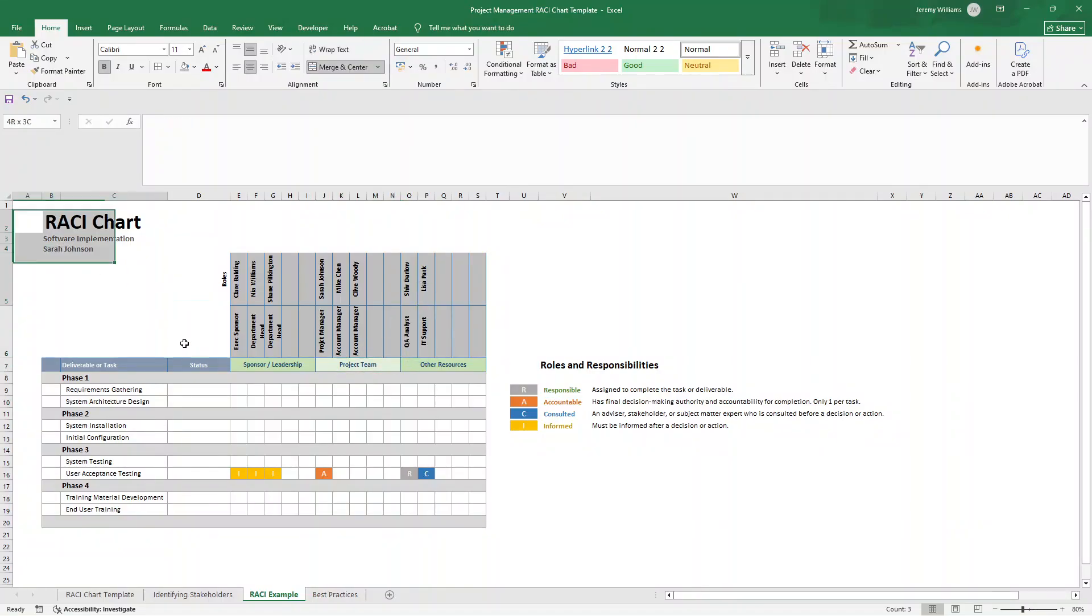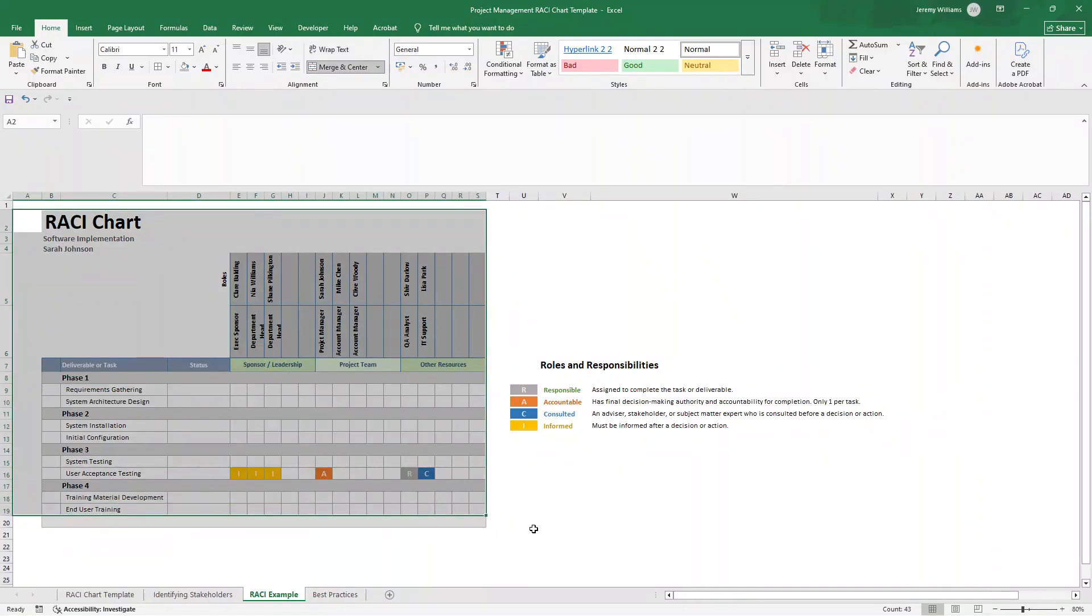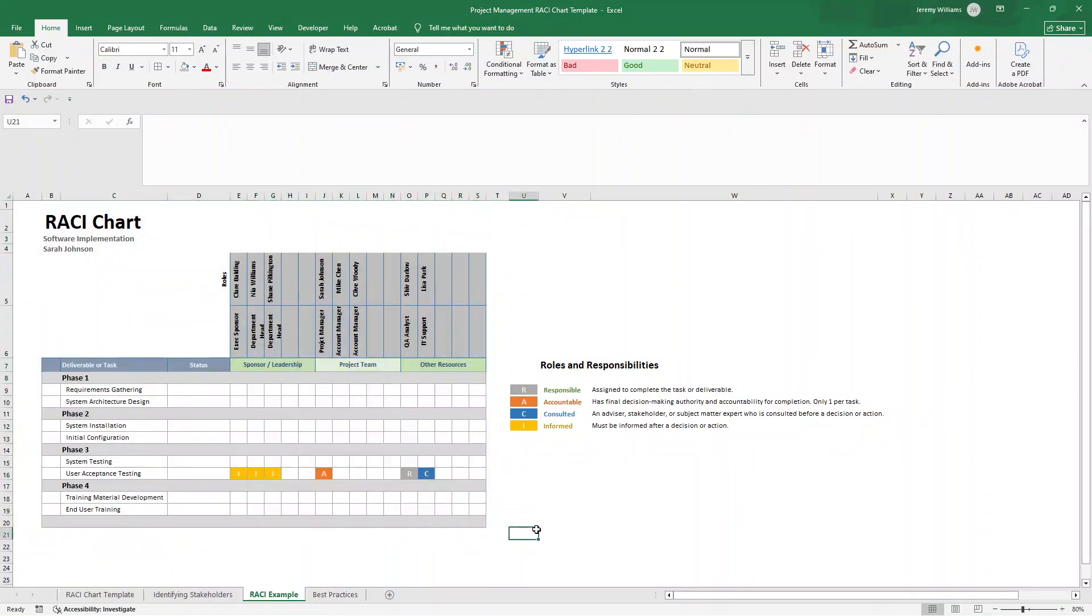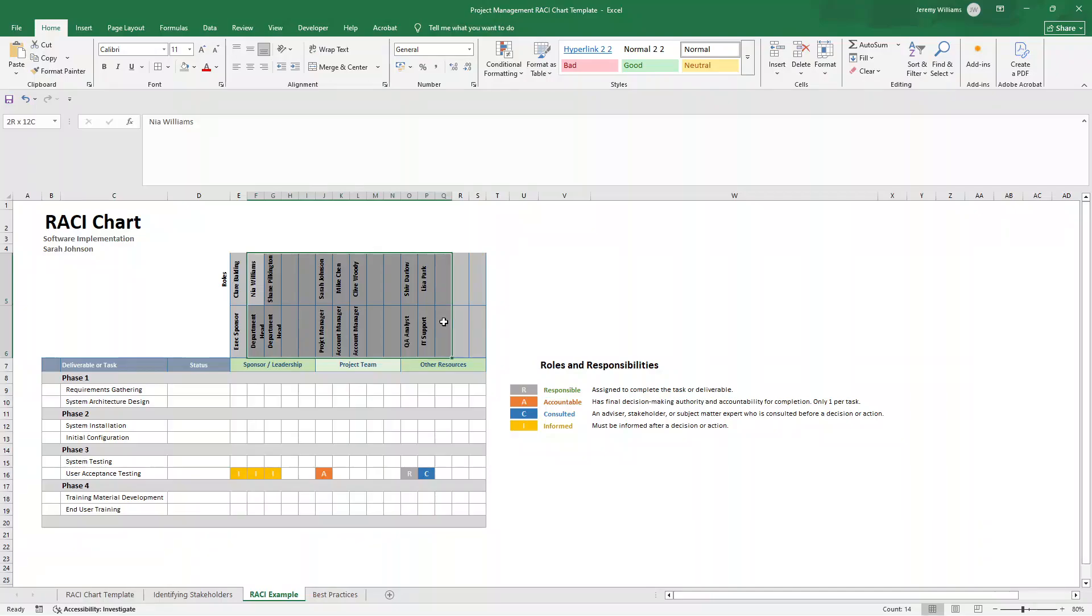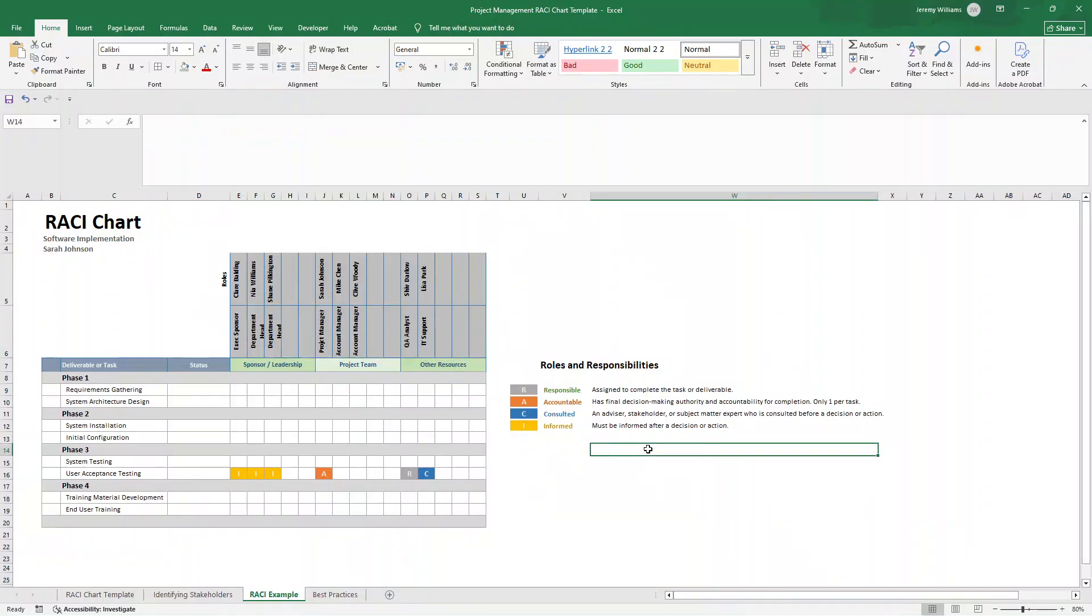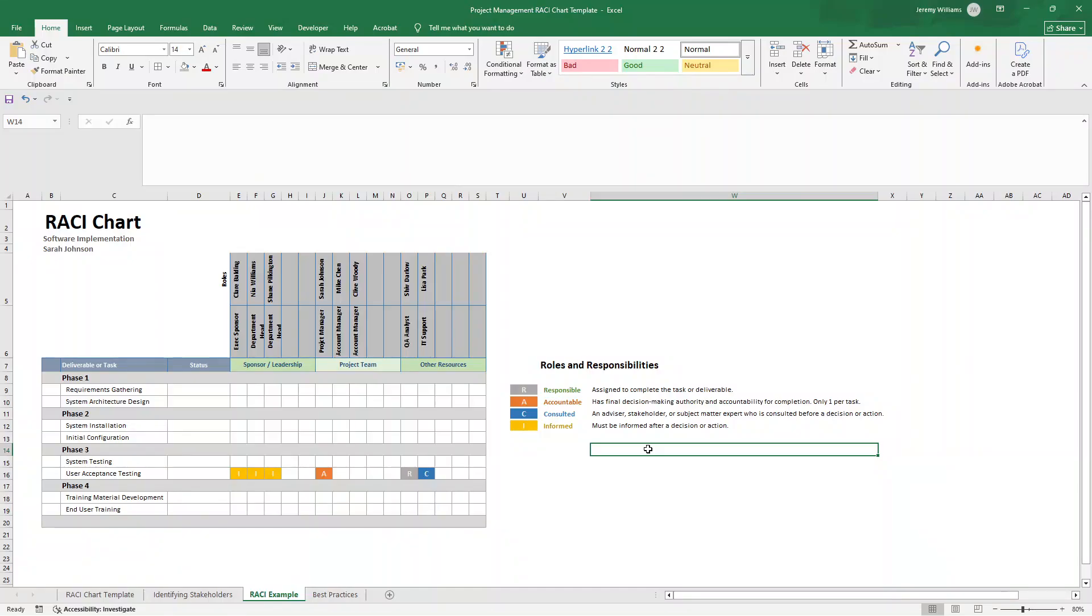So who will have access to your RACI chart? Ideally, it should be accessible to everyone involved in the project. So for this software implementation project, it should be all of these individuals and perhaps even a few more. You want to store it in a shared location like SharePoint, Google Drive, or your project management tool. Everyone on the project should be able to view it. But typically, only the project manager or team lead should be able to edit it. Project managers will use this as your roadmap for coordination. Team members will reference it to understand their specific roles, and stakeholders will check it to see where they fit in. New team members will use it for onboarding and role clarity.